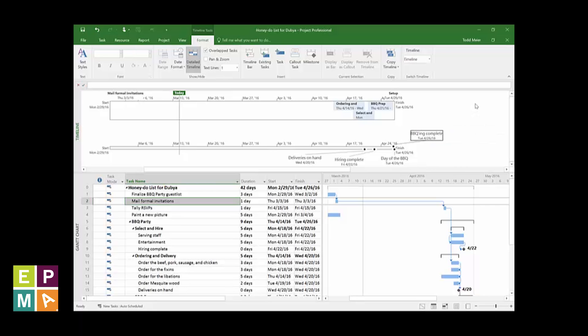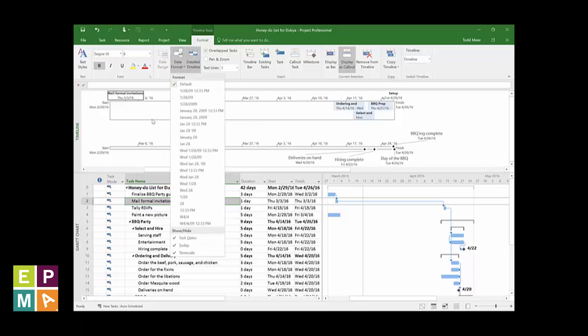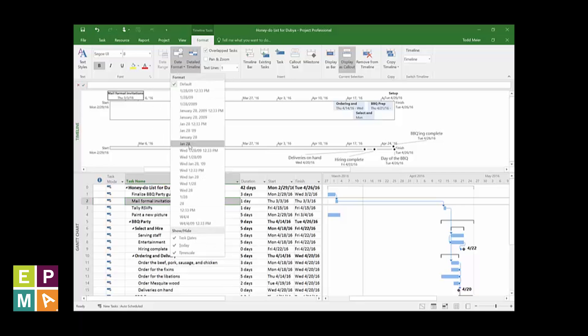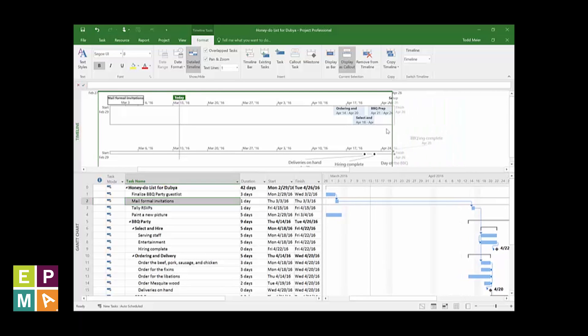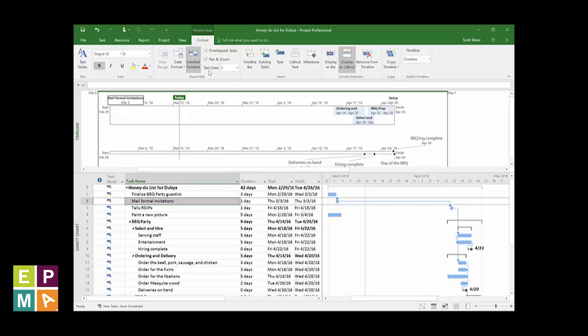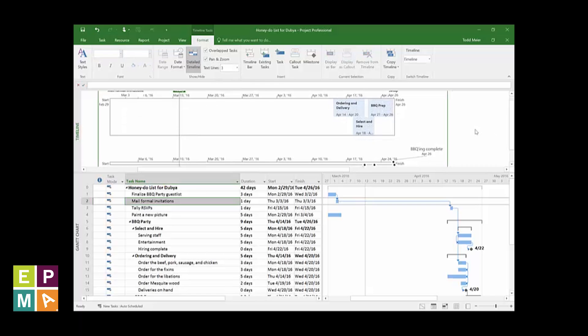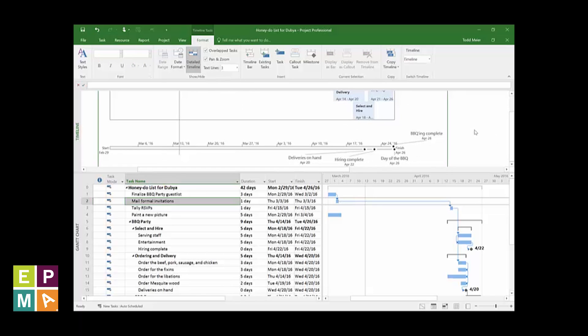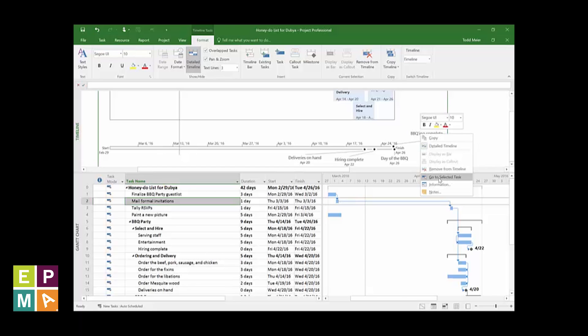What else I got? Oh, here's one. Select a task from the top timeline and change the date format. Use the date format picker in the Show Hide section of the Timeline Tools Format tab. Here's another couple. With the Pan and Zoom checkbox selected, I can use the timeline to change my Gantt chart timescale. See? You can increase the thickness of the bar-style items in your timeline by increasing the number of text lines, like this. Finally, a really neat feature when you have a schedule that's packed with activities: You can quickly and easily navigate to the task in your schedule by right-clicking on a summary task or milestone in the timeline, and choosing Go to Schedule Task.